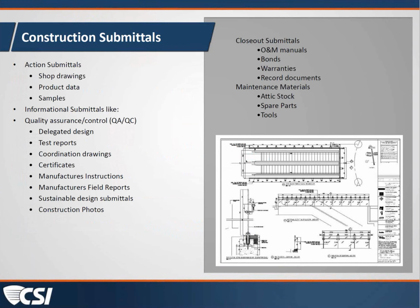Matthew, do we have anything from the group? We just have a comment coming in here from Paul Sternberg, who, if I remember correctly, was on the group that helped do our practice guides, noting that there is no specific title for change drawings, i.e. what we've been calling bulletin drawings in this presentation, within the CSI practice guides. They go with whatever CA document was used to transmit the information: RFI, ASI, proposal request, construction change directive, change order, etc. So for any of you that may also be studying for an upcoming CSI exam or have used the CSI practice guides in the past, don't be confused; Paul's indicated that we do not have a specific title that we call it by in CSI's publications. This is just additional information within this session. Other than that, it looks like we have answered most of the questions that have come in so far.